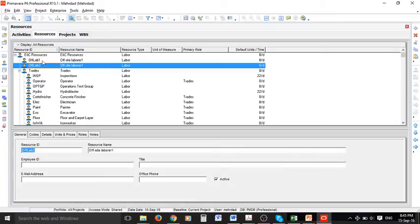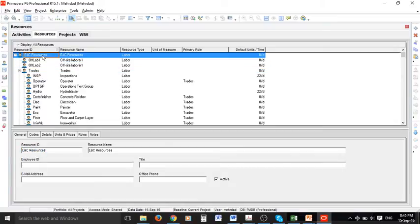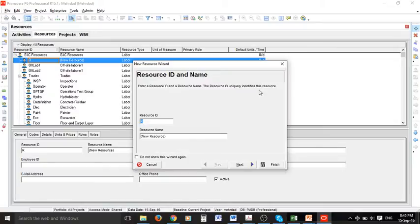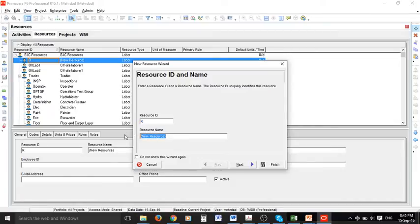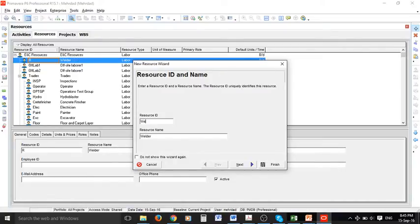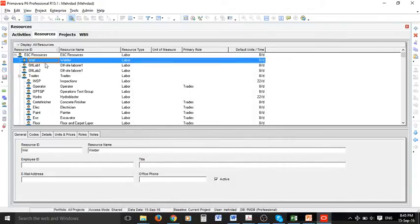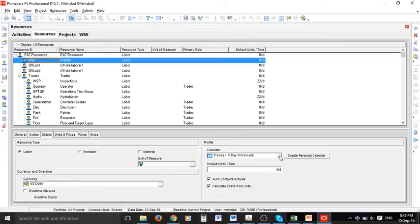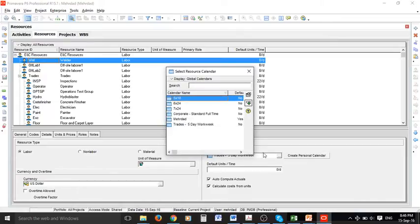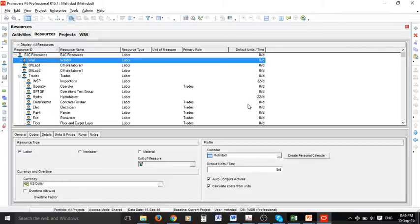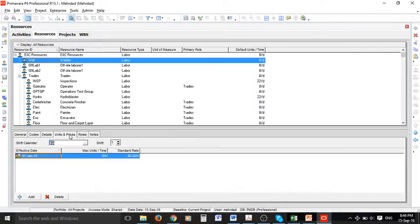Let's add another resource and then we can name this one for example vendor and the ID is short form so it's a labor type. Again we can go to check if it is an active resource and also change the calendar to our desired calendar and other changes if we want to make.